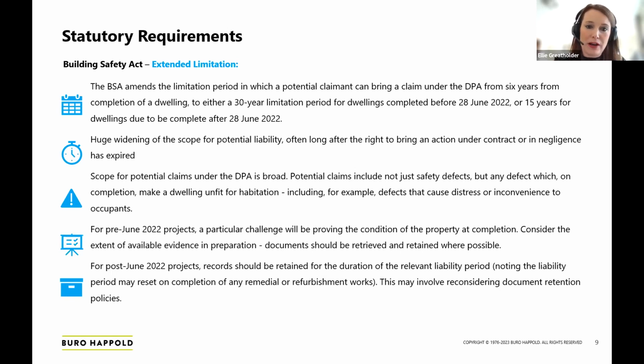And I guess the bit that we do have more control over is buildings that are completed from now on effectively. And it's really important there that records are retained for the duration of that relevant liability period. And here it is important to note that the liability period might reset on completion of any remedial or refurbishment works. So when I talk about the 15 years, it may well be that that's extended. So this will involve considering document retention policies for projects going forward.